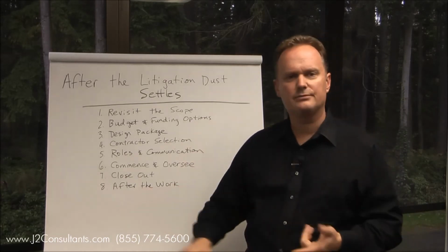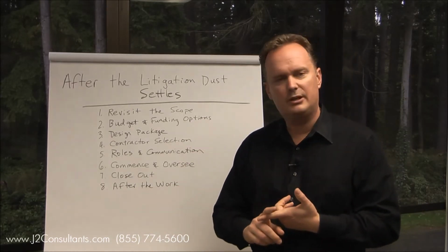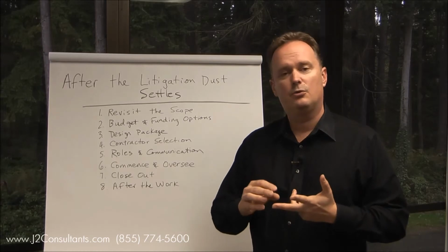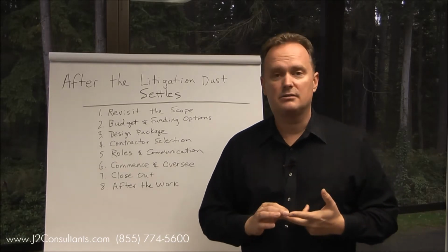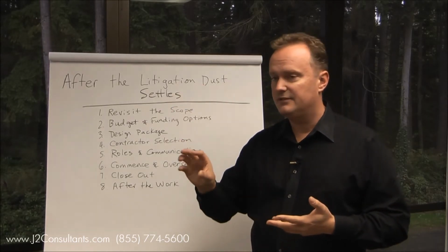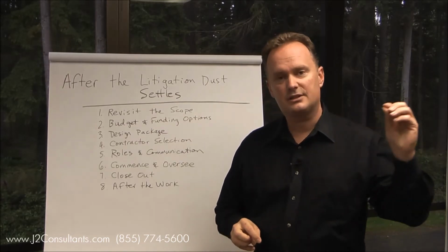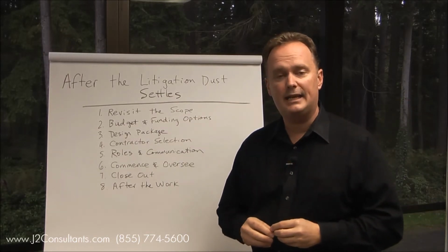And then after the work, make sure that whatever your warranty period is, if it's a 1-year warranty, we'll come back in at 11 months and just walk around and say, hey, your sealant's failing, or there's a little bit of an issue over here. Let's get it fixed under warranty while we still can.